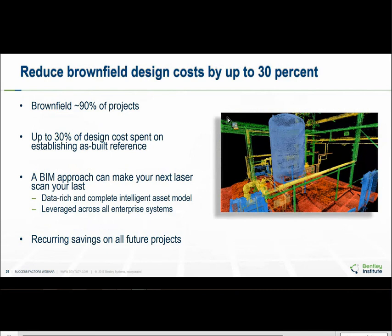Up to 30% of the design cost of a typical brownfield project is spent on executing and processing site surveys and laser scans to address out-of-date or missing plant records. At the project's end, drawings become out of date as equipment changes occur during operations and maintenance, forcing each project to repeat the cost of establishing an accurate as-built reference. Bentley's plant design solution breaks this cycle. The solution enables the construction of a data-rich intelligent asset model that's a single current source of information for your facility. Field staff access the model and provide markups that engineering uses to maintain an accurate as-built record — saving brownfield projects time and money.